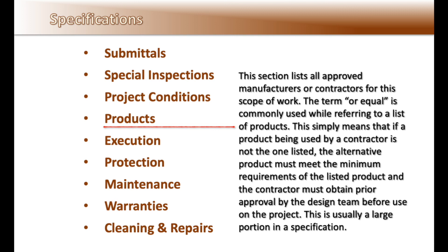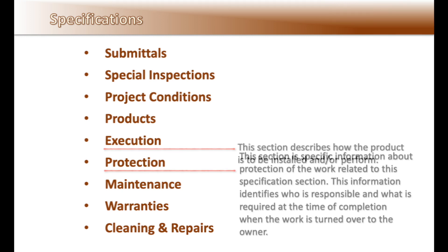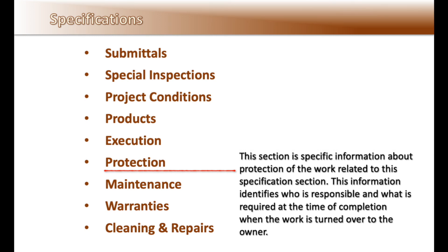Listing out materials is usually a large portion of a specification. The execution section describes how the product is to be installed and/or performed. The protection section contains specific information about the protection of the work related to this specification section, identifying who is responsible and what is required at the time of completion when the work is turned over to the owner. This section has caused many contractors extra expense due to not applying proper attention to these requirements.